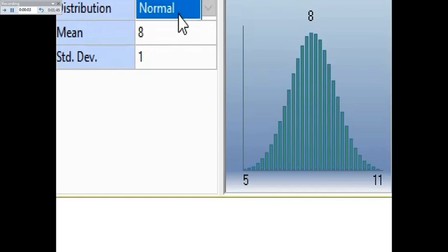Normal distribution. Is generally used where historical data is available in this format. It is often unrealistic as the distribution is symmetrical, not a common feature of task durations. The normal distribution is defined by its mean, remaining duration, and its standard deviation.